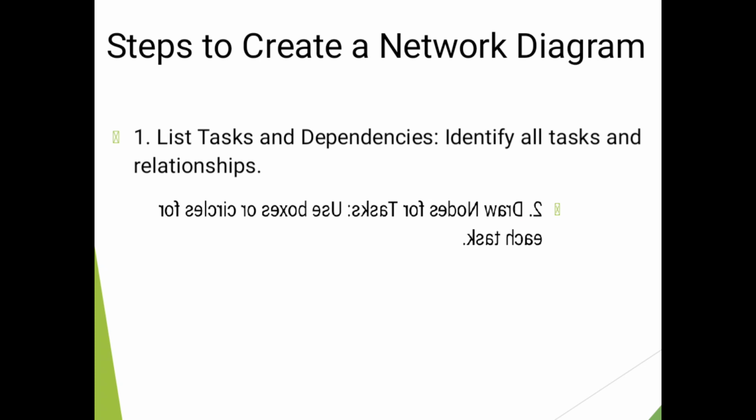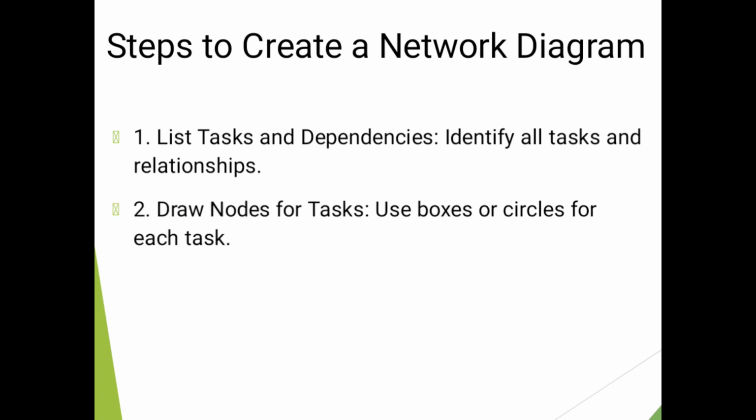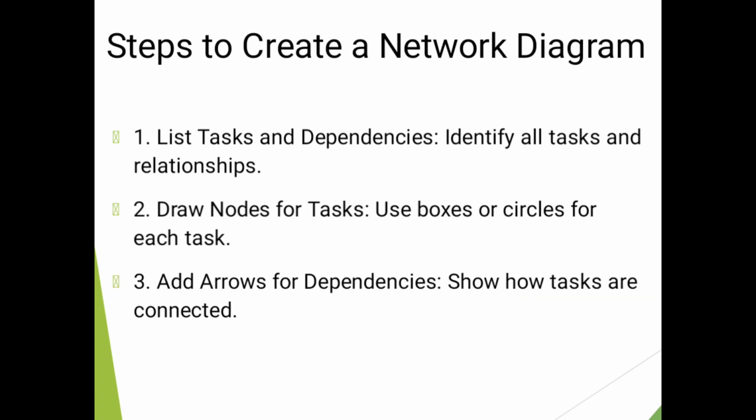From there, you need to draw nodes for tasks. You can either use boxes or circles, so you draw those particular boxes. And from there, you need to draw the arrows which are going to show the dependencies. Those arrows will be used to connect the nodes, the boxes.